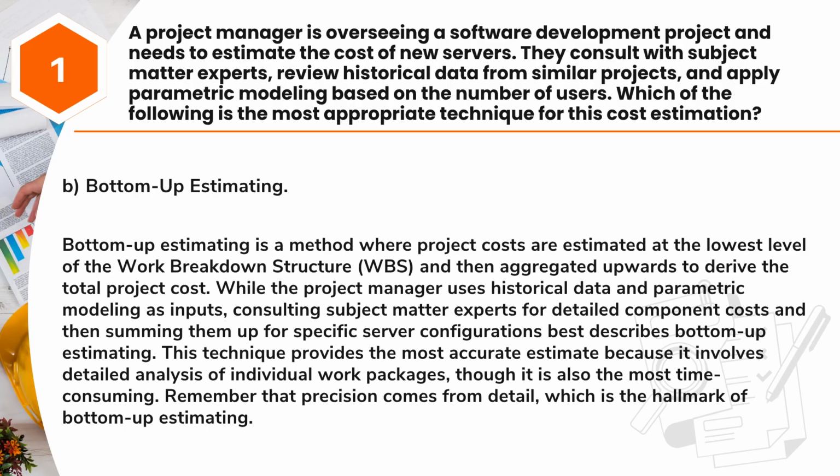Answer: B. Bottom-up estimating. Bottom-up estimating is a method where project costs are estimated at the lowest level of the work breakdown structure, WBS, and then aggregated upwards to derive the total project cost. While the project manager uses historical data and parametric modeling as inputs, consulting subject matter experts for detailed component costs and then summing them up for specific server configurations best describes bottom-up estimating.